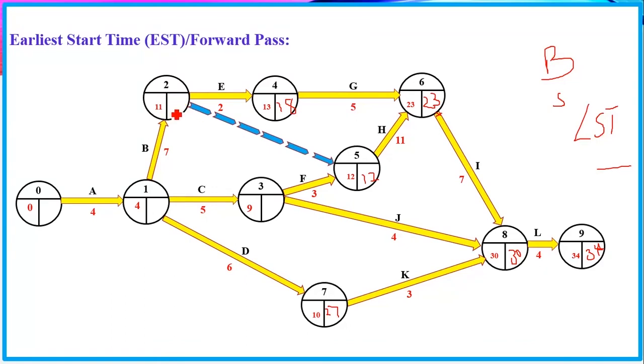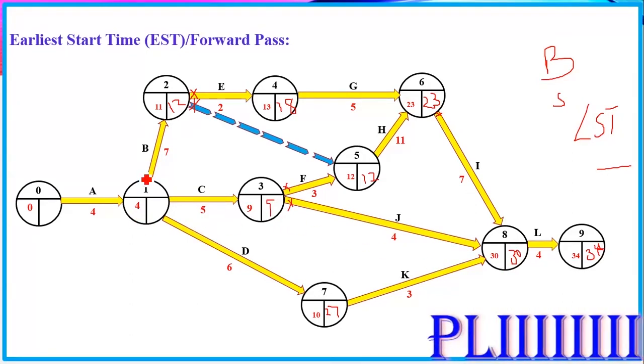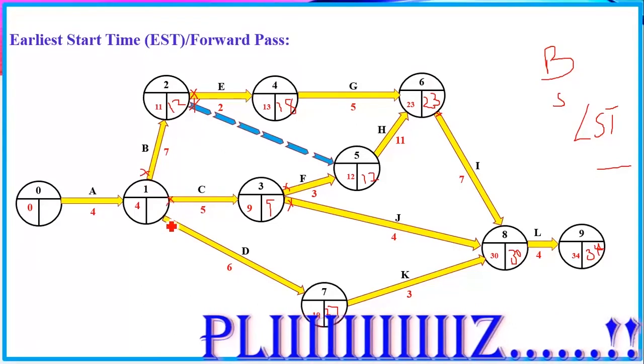Now for this case we have two arrows, we have this one here and we have this one here, where this is 18 minus 2, which is 16, and then this is 12 minus 0, which is 12. So you go for the smallest, so we're going to pick 12. Then in this case we have two, we have this one and this one here, so we have 12 minus 3, which is 9, and we have 30 minus 4, which is 26, so we go for 9.